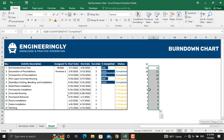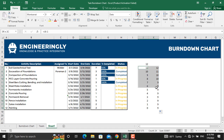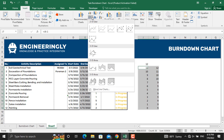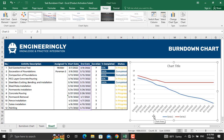Now we will plot these values on a line chart to represent our burndown chart. Select the end date column, hold Ctrl and also select the planned and actual columns, then go to Insert, select Line Charts, and choose the first option. Move the chart to the right.